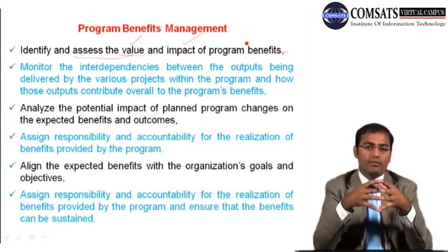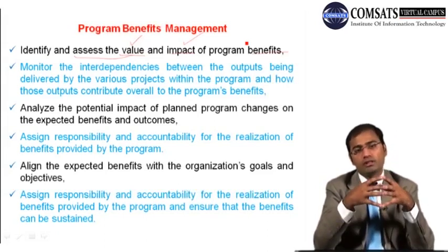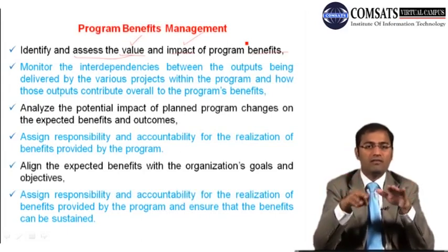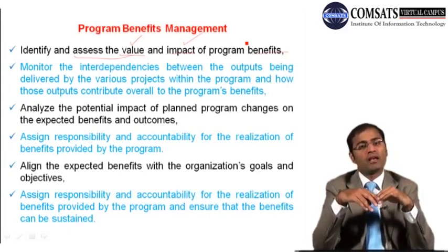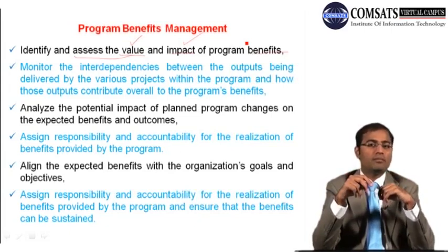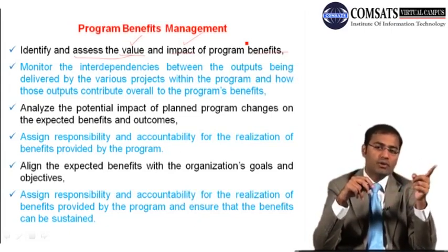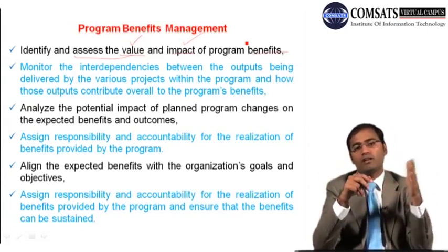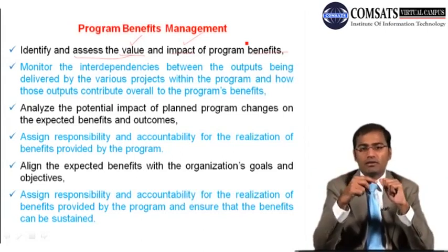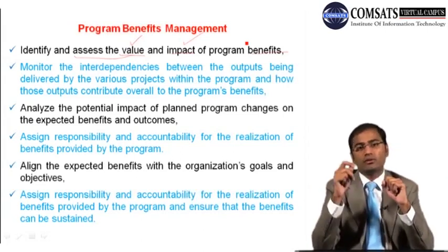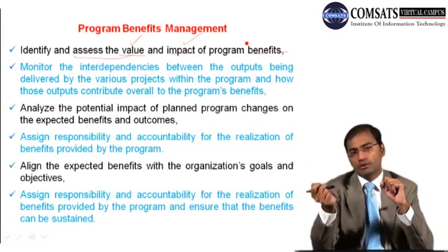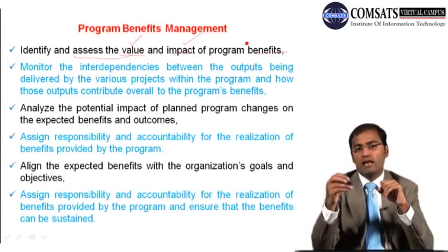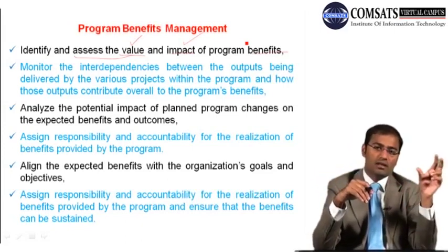But what if you withdraw resources from the project which is at par, which is 50% complete and which has given 50% benefits, and you want to exploit and capitalize or maximize on the project number 1, which is like 50% complete and giving you 70% benefits. So you want to capitalize on that project, and taking resources from project number 2, that is 50-50, will make it vulnerable, and hence you may not get the maximum benefit.